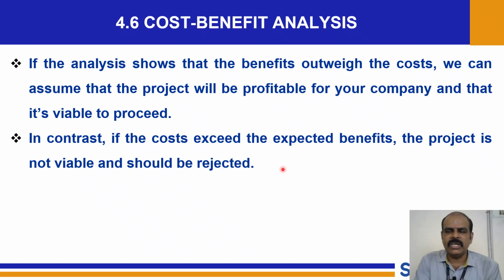We are doing an expenditure of 100 rupees. The benefit I get is 90 rupees. No, the project or the activity should be reconsidered. Before rejection, it should be reconsidered. On the contrary, we spent 100 rupees, but the gain we get is, say, 150 rupees, or more than 100. Okay, then obviously the project can be considered. So that is how we draw inferences out of it. So it is very simple, but identifying is going to be a very crucial thing, so that we learn in the upcoming slide.